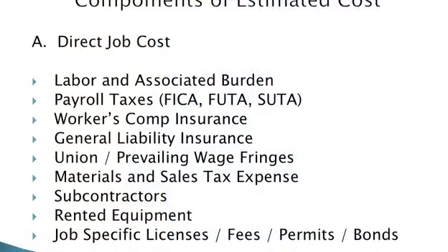Materials, you make a call, you find out what that concrete costs, right? You make an agreement that in the next 6 months, if I buy X amount of concrete, it's going to cost me this. You buy out the job, you write a purchase order, there's a contract, that's a fixed cost. You shouldn't lose any money on that. Shouldn't. Depending on the estimate, shouldn't. Depending on whether the estimated quantity is there or not, right? If you go in and say, oh, there's 5,000 cubic yards needed and it ends up being 12,000, you either hope to write a change order or you take it on the chin, right?